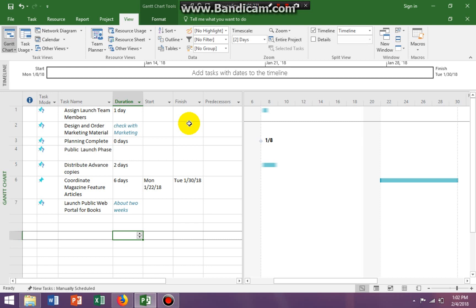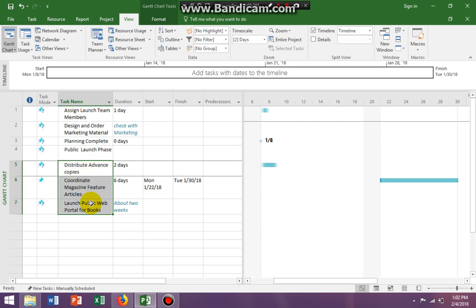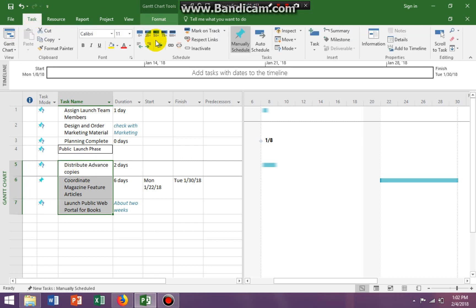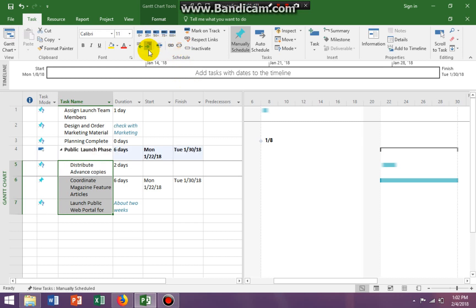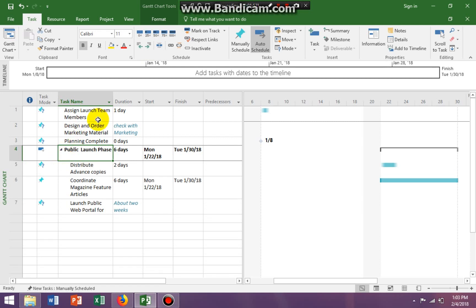Now I'm adding my summary task. And what I'm seeing is it says make public launch task, the summary of task 5. So I'm going to highlight everything below 4, because the public launch is the summary. And I'm going to the task tab and I'm clicking on indent. So this is my summary tab and it rolls up. So that's correct.